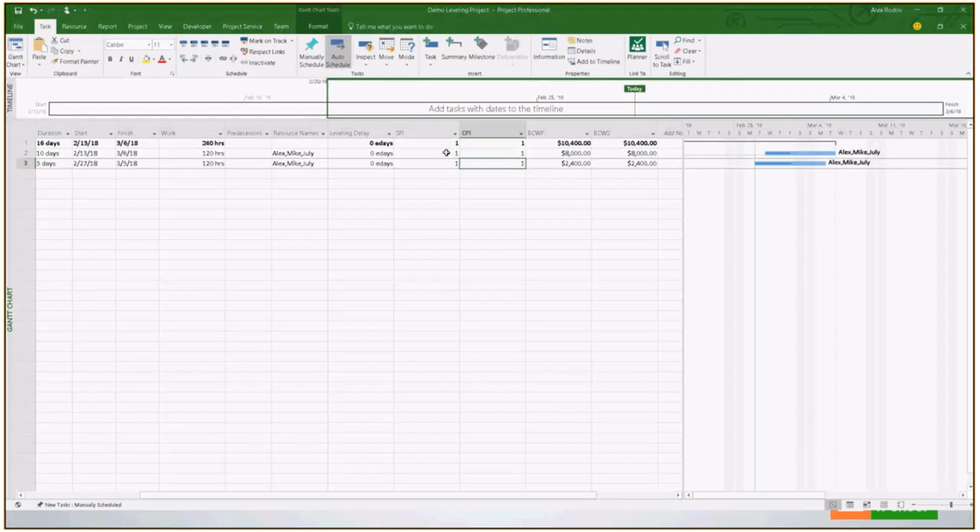But basically, what I'm trying to say is, if you have the entire schedule lined up and have these 3 things lined up, the resource cost, whether it's $1 or $10 or $50, will change these numbers, but relative metrics like CPI and SPI can be calculated, as well as the baseline and the status date, and your earned value metrics are going to be calculated automatically within MS Project.